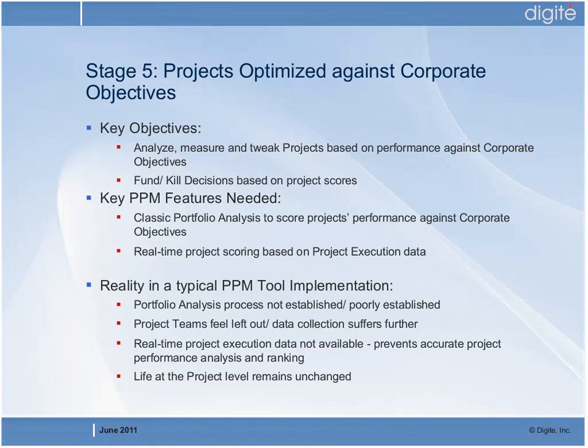The reality in most cases is that the portfolio analysis process is not established or is poorly established. So that whole process of a quarterly appraisal of all the projects in the portfolio, the way to collect data against it, the way to do weighted scoring of those projects, never gets established. On the other hand, project teams themselves don't get to see much of the benefit of the PPM tool, and they tend to feel left out.